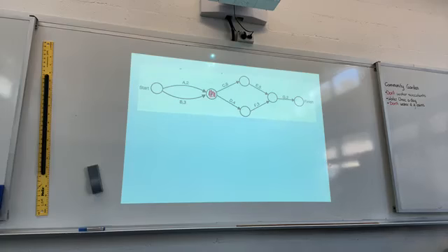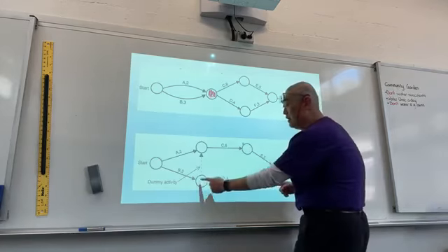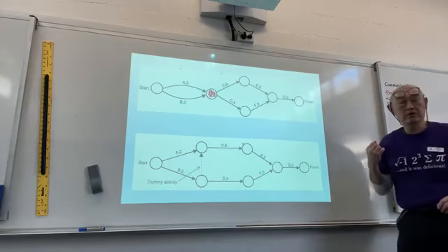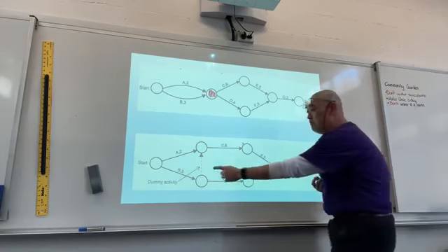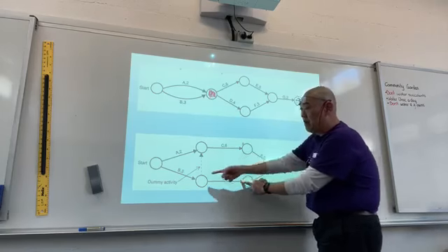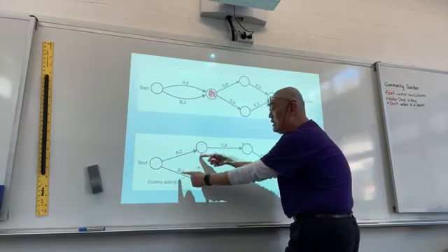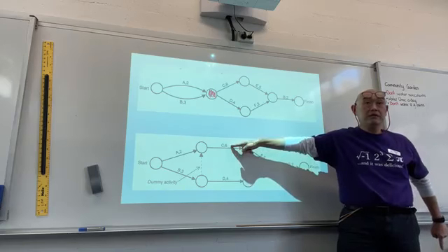Now, when I split into two, you can see that it's a better representation of what the precedence table shows you. B is the immediate predecessor of D. Because I split that, B going through there is the immediate predecessor of C as well.